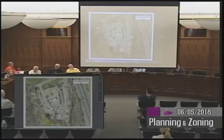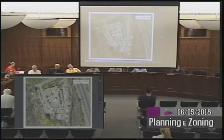But we are also doing some excavation work on the site in the area to help offset the loss in floodplain storage. Right now, the facility is operating under an existing DEP stormwater permit for the site. We've met with DEP. We've talked about the fact that we're looking to replace it. They are a proponent of the project. We'll have better control over the salt, less chance for runoff when it rains. The material will all be covered, which I'll show you some details of what the structure will look like.